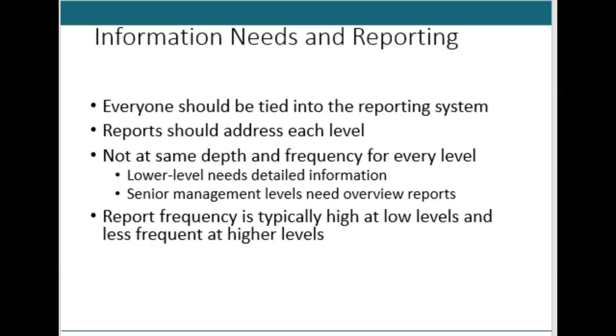So lower level people have a need for detailed information about individual tasks and factors affecting those tasks. Where higher level, you might just report a milestone chart, right, and address them and answer their higher level questions, right? That would be for senior managers. So they might get an overview report, which describes the project in a more aggregated form going up the chain.